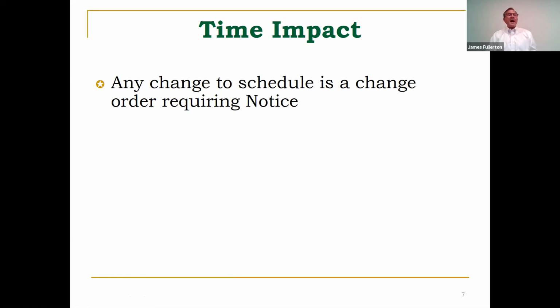In other words, about once a year I will have a client in my office, or nowadays it's always on the telephone, saying, well, the owner won't pay me for all these changes. And I say, well, okay, what were the changes? And show me where you have signed change orders for any of this work. And they won't have signed change orders, and I have to tell them, you're wasting your time.